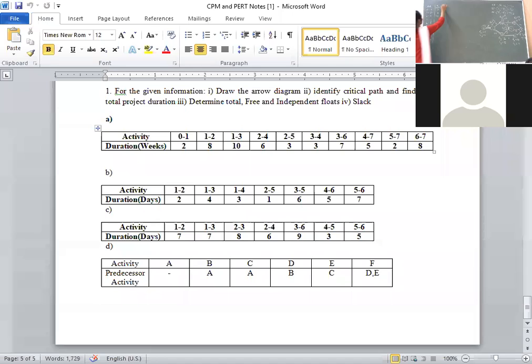Right now you know how to write earliest start time, EST, and earliest finish time. Similarly LST and LFT; we have already calculated those also. Earliest start time means starting from the start node, for the activity i to j. Earliest start time, that is E0. From the network diagram, E0 value is 0.